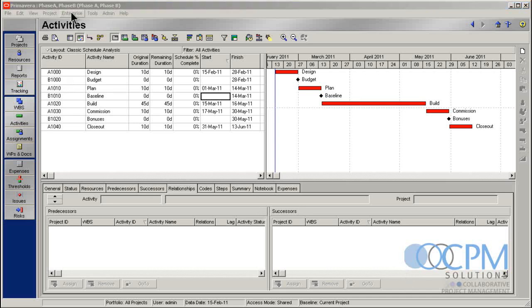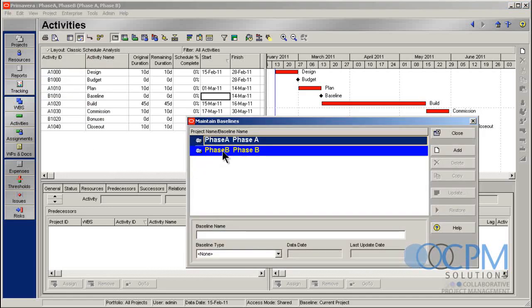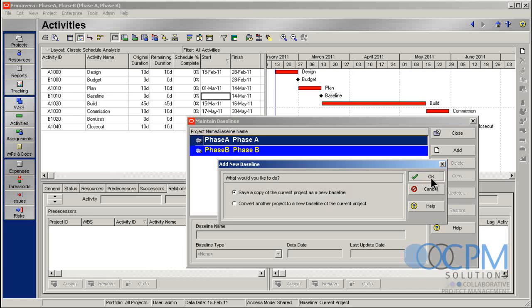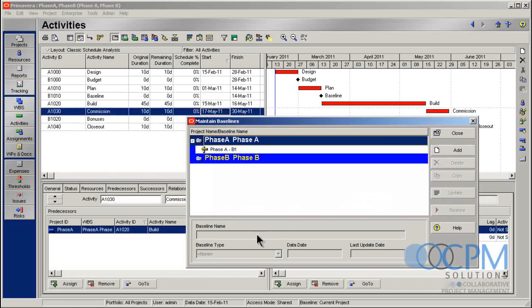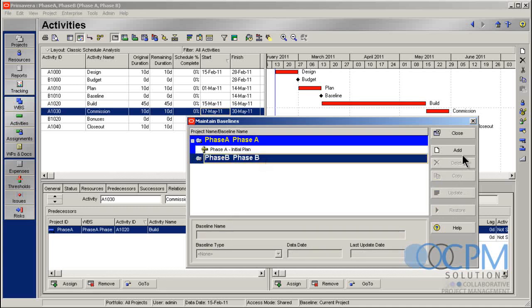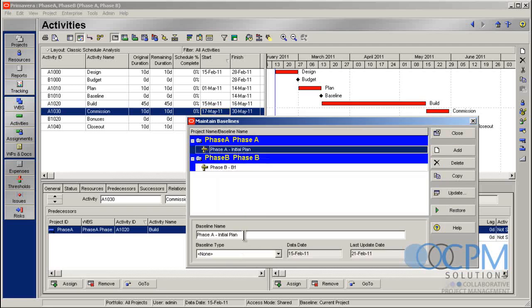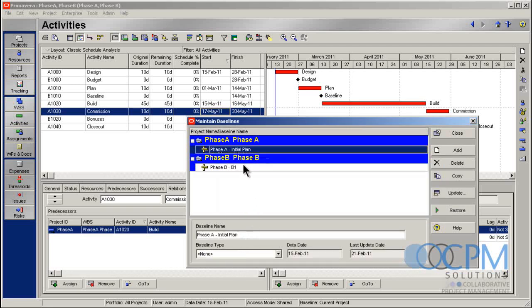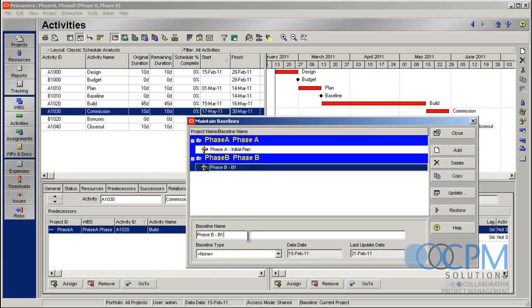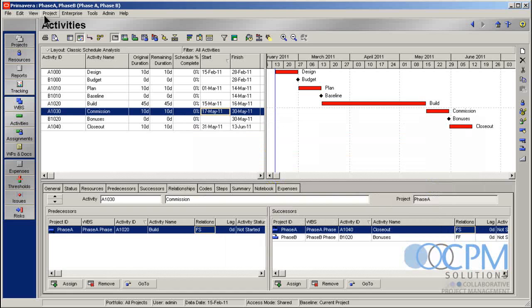The next step we're going to do is we're going to go and create some baselines for these projects. So again, I'll go up here to maintain baselines. I've got my phase A project, my phase B. So let's go ahead and add in a baseline for project phase A. Primavera's doing a little bit of thinking. There it is. Okay, we'll call this my initial plan. Go ahead, do the same thing for phase B. Great. Those are created.